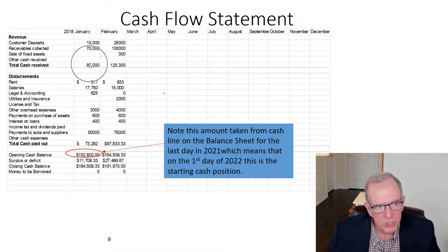That's our expectation. And then we would look at the disbursements, the money that we expect would go out during that month. So we would have our opening balance, and then the money that we would expect to leave. So maybe payments to subcontractors, direct payment costs, job costs, and overhead costs.